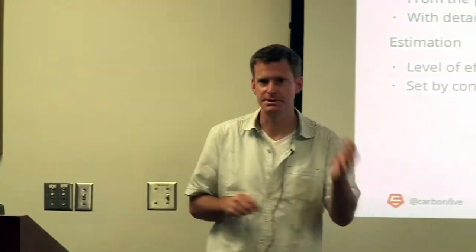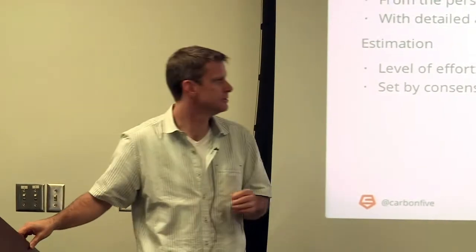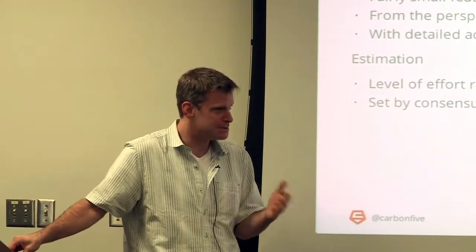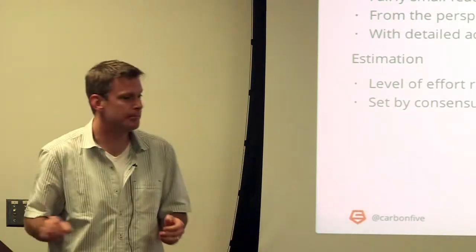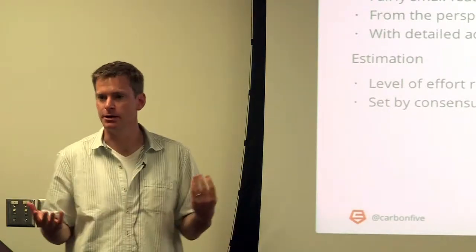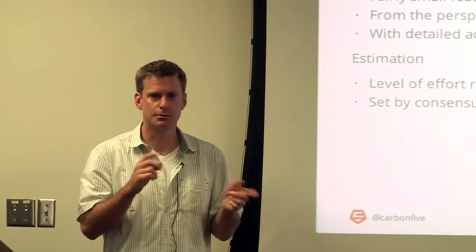And you push that code to your staging server, your QA server, your acceptance server, whatever it is, a place where you test. And you press the deliver button. And now the business guy or the hustler or whoever the design person may be, anybody who's not the person who just coded it, goes in and validates it against the acceptance criteria that you agreed on and wrote down. And they either accept it or they reject it.